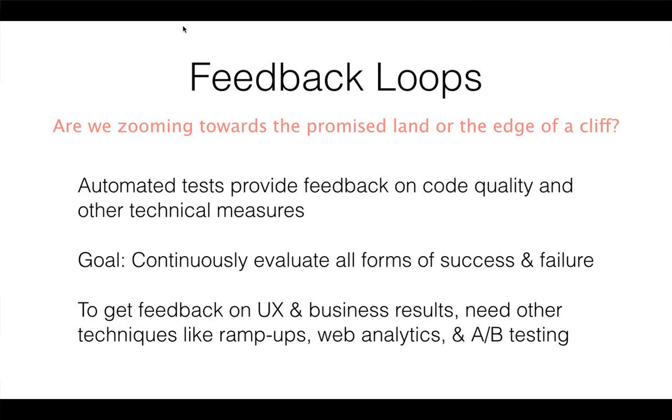And what we want to do when we're pretty certain we want to do one of these new features is to get it running in production as quickly as possible so that we can get feedback on it, both from users, but then also from integrated instrumentation using web analytics technology like IBM Digital Analytics. So, for instance, with the V2 website, I remember we wrote the first line of code on a Thursday, and we actually had the first new V2 web page running on a Friday. Now, it didn't look great, and we didn't surface it to users, but it was available, and then we could start sharing it with our stakeholders. And then as the technology gets more mature, you can actually measure how the users are perceiving it.